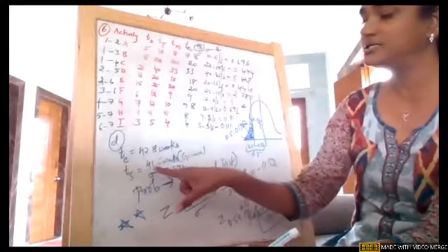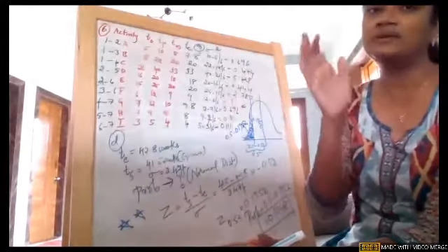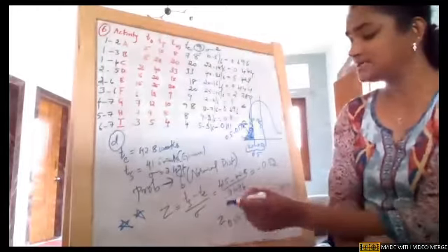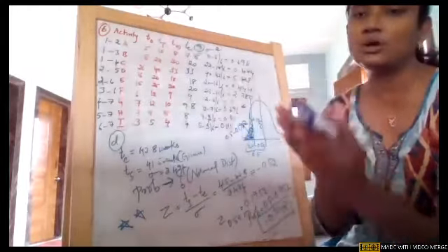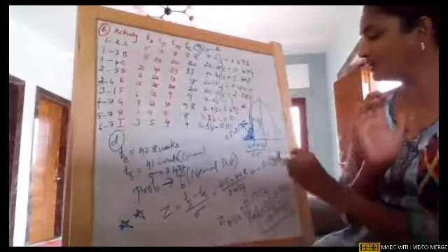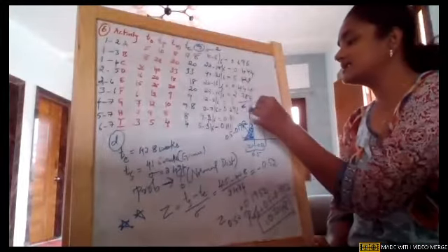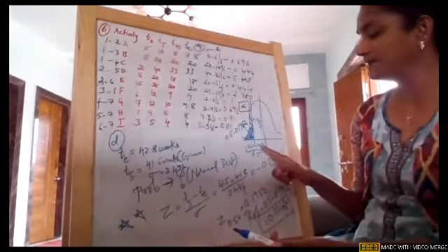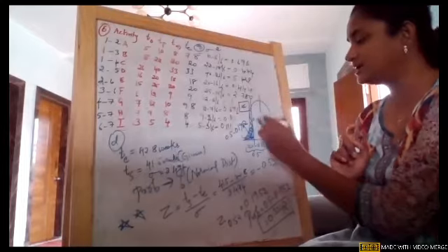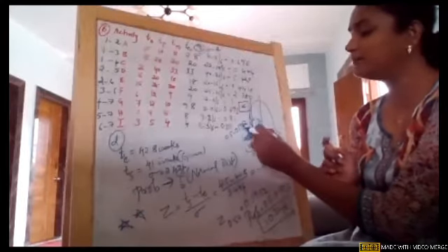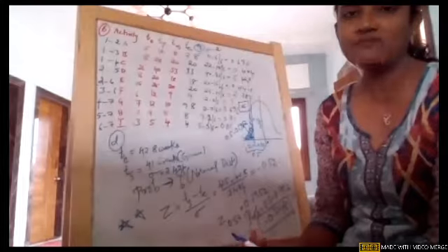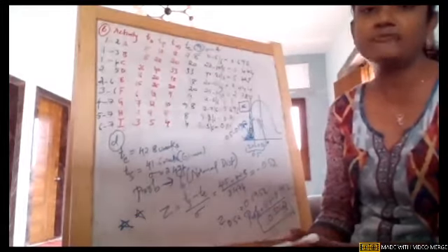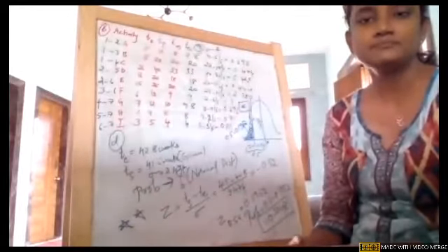They gave us a duration and asked what is the probability that the project will be completed within 41.5 weeks. We applied simple normal distribution because it is the less than or equal to symbol, to the left side of that particular line. Every time our table value gives from origin to that particular line, so the left side of it is nothing but 0.5 minus 0.1952. So this is the probability that the project will be completed in 41.5 weeks. Any doubt?